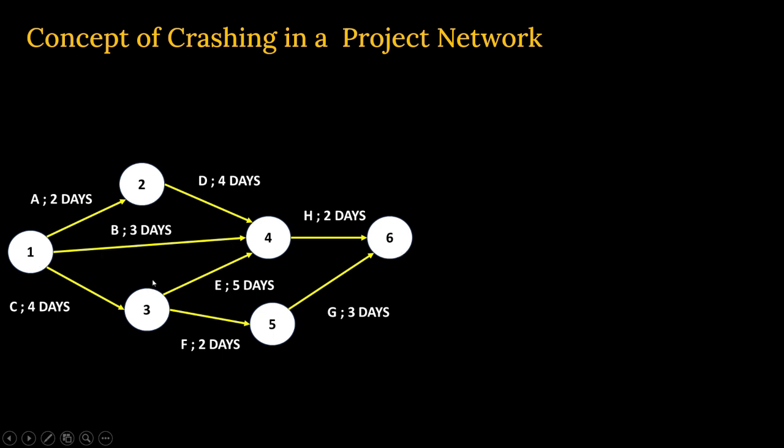In between, there are multiple activities, termed A, B, C, D, and we have also mentioned their actual duration time. If you want to crash the project, you have to do it on the critical path. So we first have to find out the critical paths, and we'll go by the path method as we have learned.